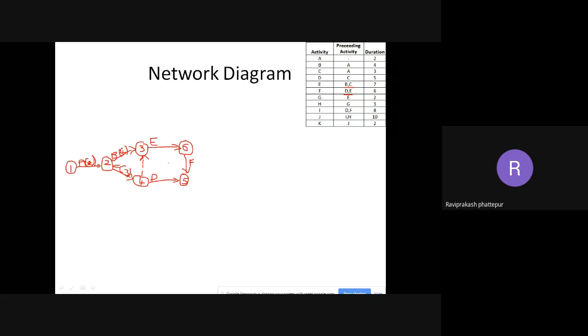So here if you see, if I do this, I am coming to this particular node 5 after E only, then D is also before that. So this satisfies both. F is after D and E. Just a small change I could do so that you could understand better. Ballpoint pen, eraser. So instead of 5 I am drawing here.